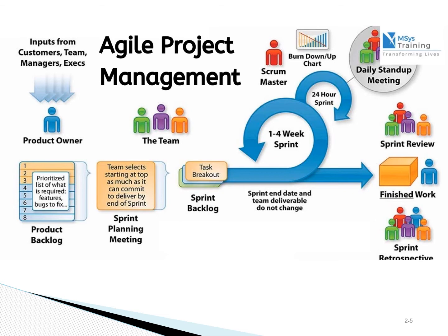In our course, we actually went with a 3-week sprint cycle, and after each sprint, the project delivers some functionality, and they will be put in place, and as they go through this, they keep track of what is left for them, and as they start the next sprint, they pick up the most critical functionality and features that are required, and they would put that in the next sprint.